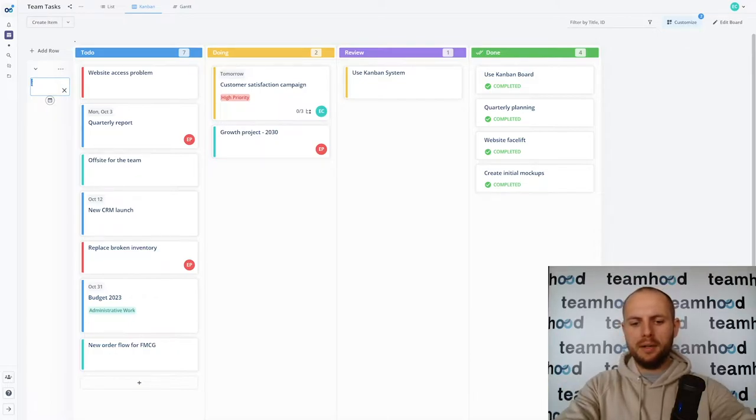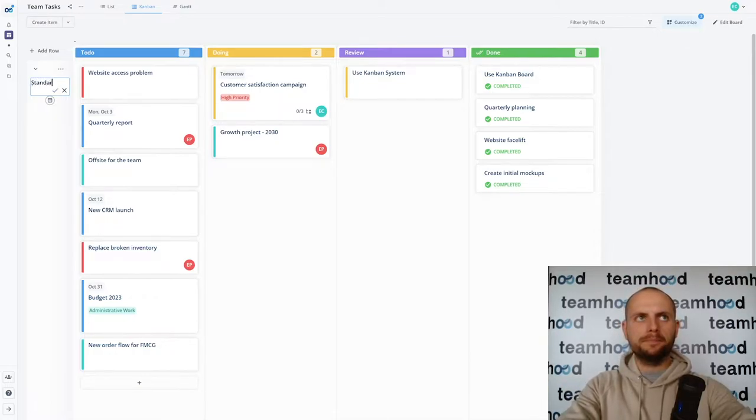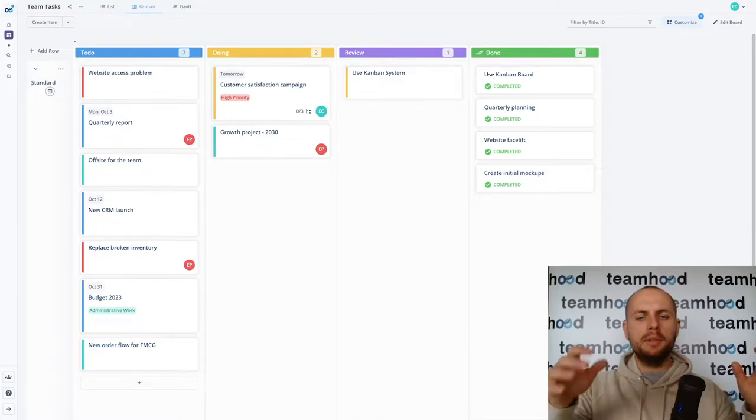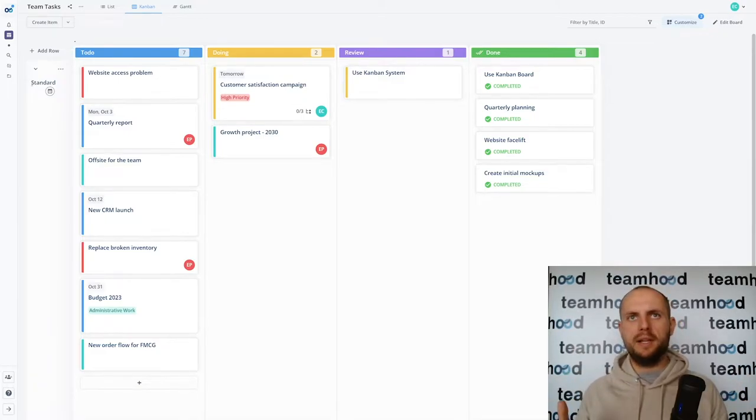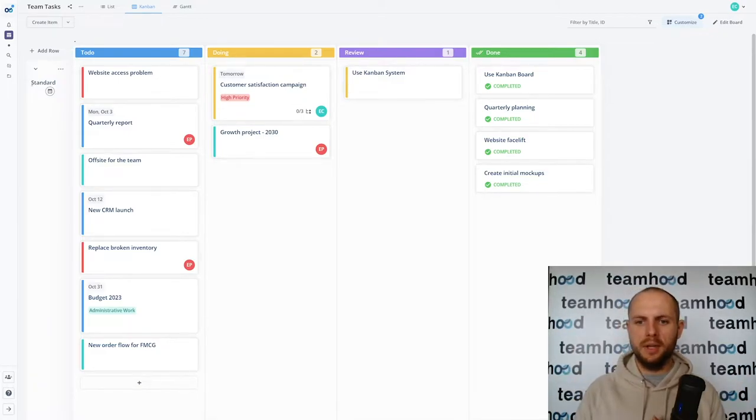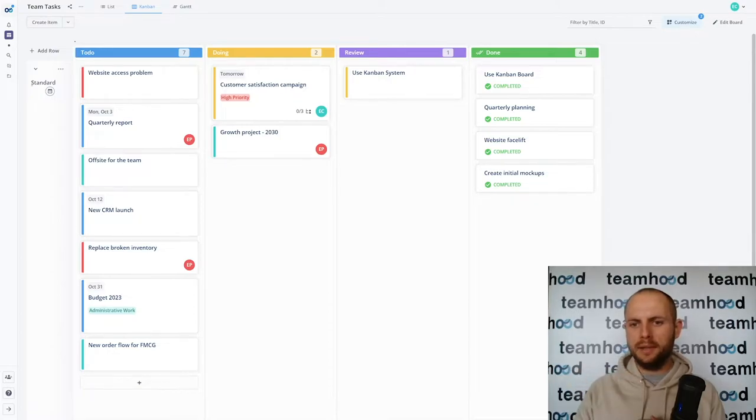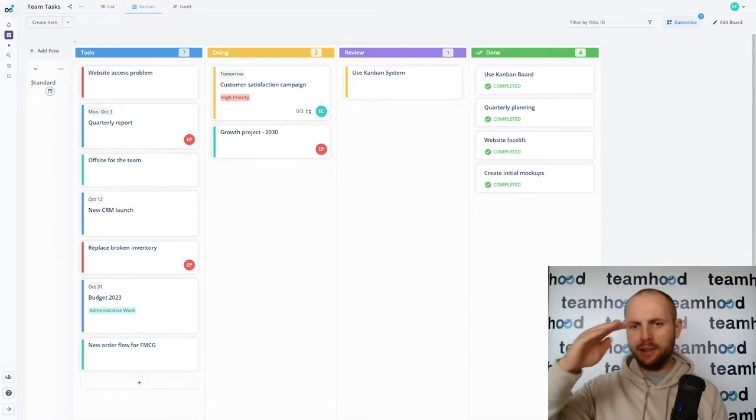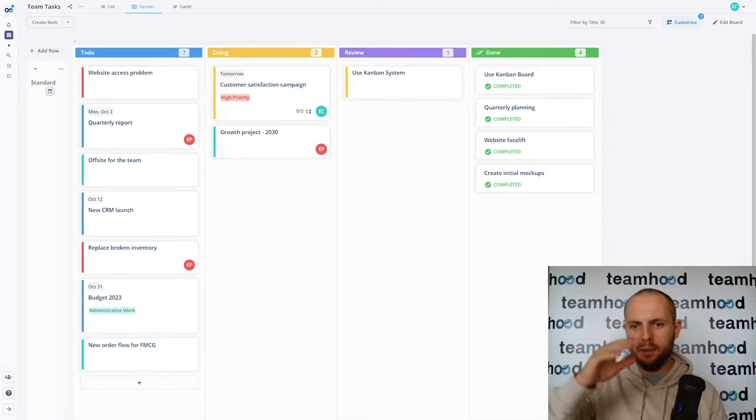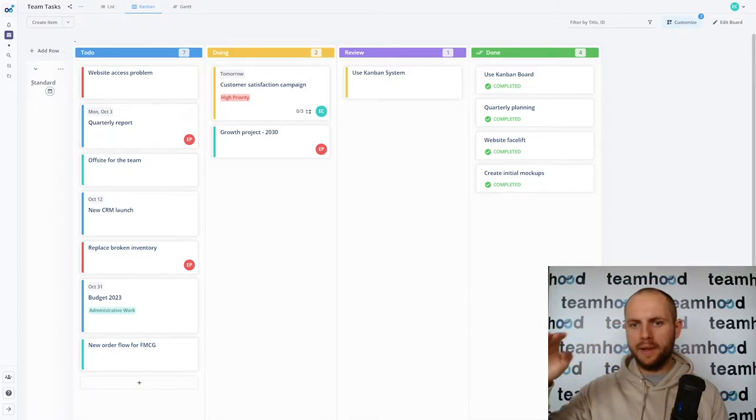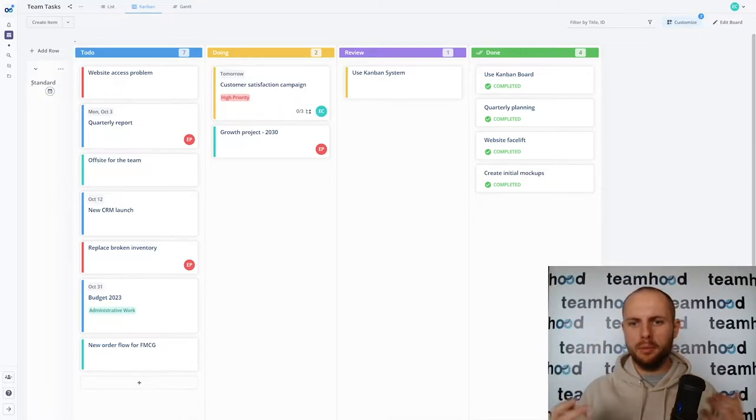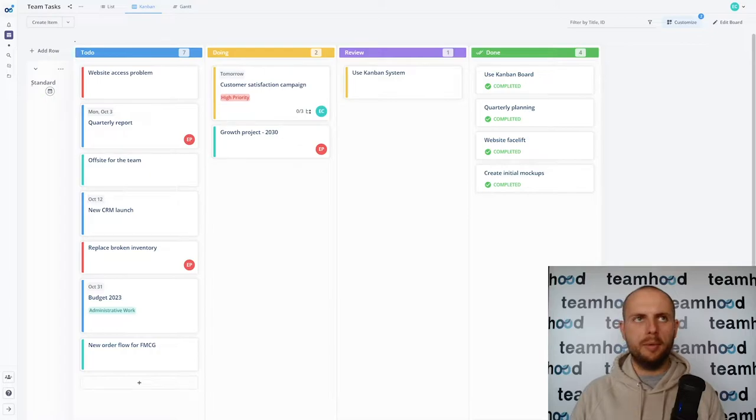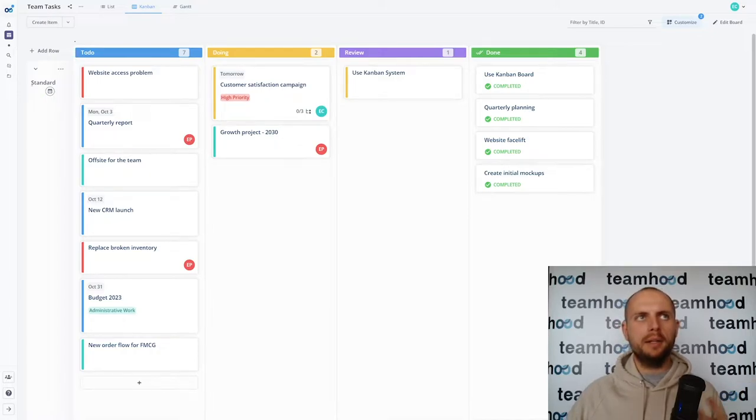Let's start with simple thing. I will introduce one first default class which is called standard. It means whenever we don't do task it just slightly degrades so we keep losing value but in the linear manner. So the more time we spend not doing it the more value we might lose.